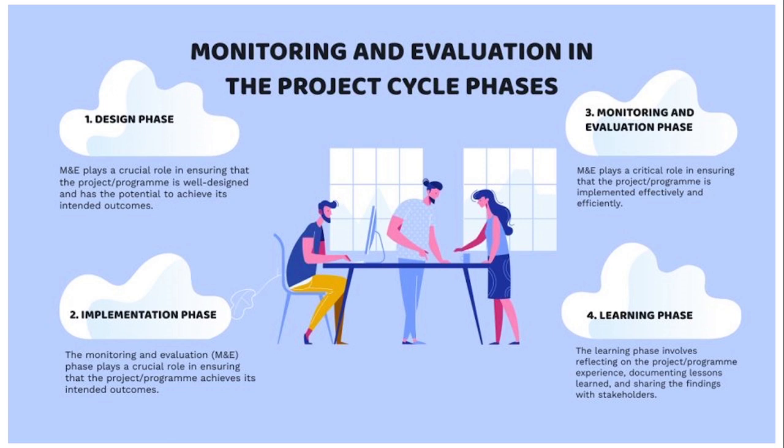After sharing that and identifying all that, you document. This is also a component in the learning phase. This involves documenting the lessons you've learned from your review or reflection phase. Yeah, the lessons you've learned from the project, and this includes documenting the successes, the challenges, the lessons learned, as well as recommendations for future projects or programs. Documentation may take the form of reports, case studies, case stories, or other knowledge products.